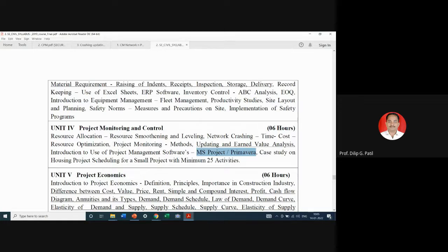So resource allocation is also one of the important tasks in that particular application. You can see resources. Suppose we require 100 people daily on the site, but sometimes as per our planning or scheduling, we see that on a particular day there may be a fluctuation of demand with respect to manpower, as 150 laborers, we can say, and on the other day we require zero laborers.